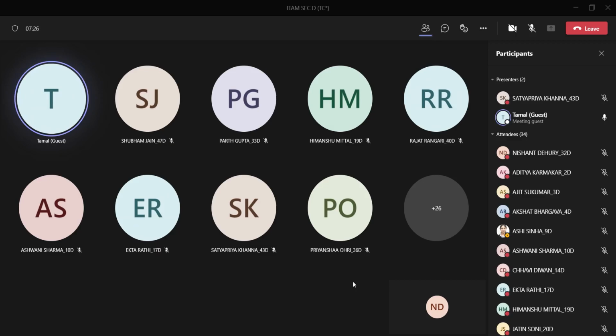PERT, which takes three types of estimations and then takes an average: optimistic, most likely, and pessimistic estimations. So then you take an average on that. So that's what we have covered yesterday. I will be sharing the PPT to you.